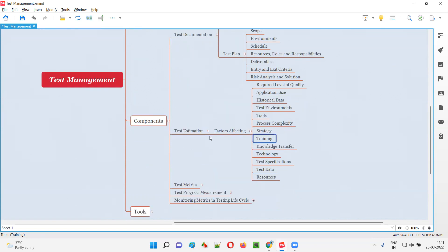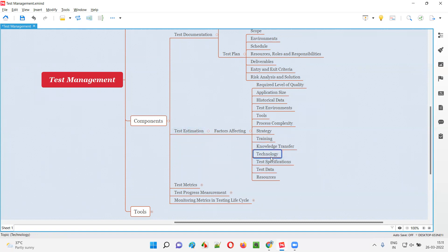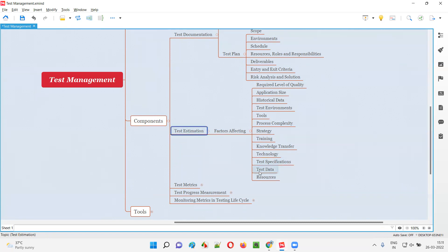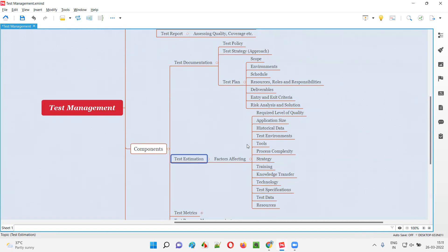Training — if any training is required for the resources, estimations will differ. Knowledge transfer — if it's an existing project and new people came, knowledge transfer is required, so estimations will differ. Based on the technology to be used, specifications based on project requirements, test data preparation — how much time and effort is needed for creating test data — and resources — which type of resources are working in the project. All these are different things done as part of test management.